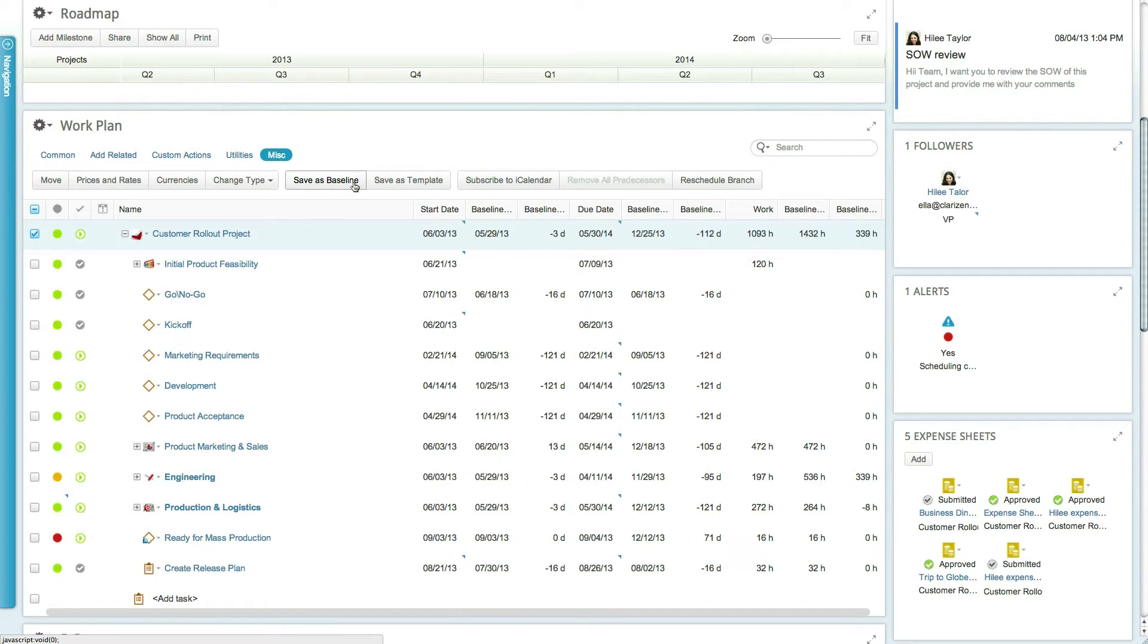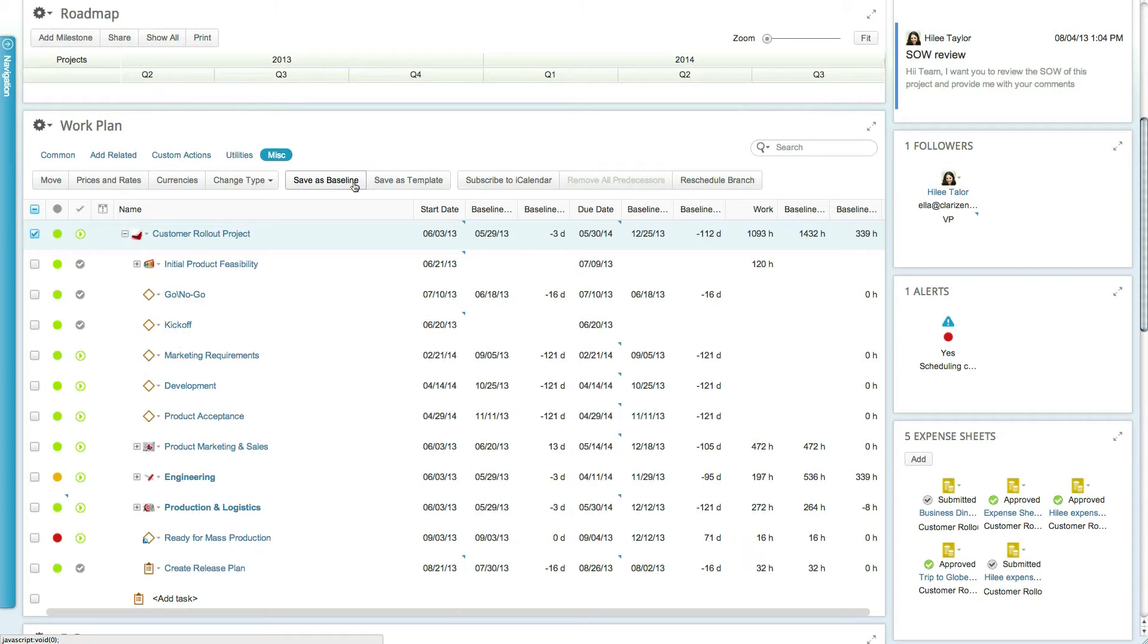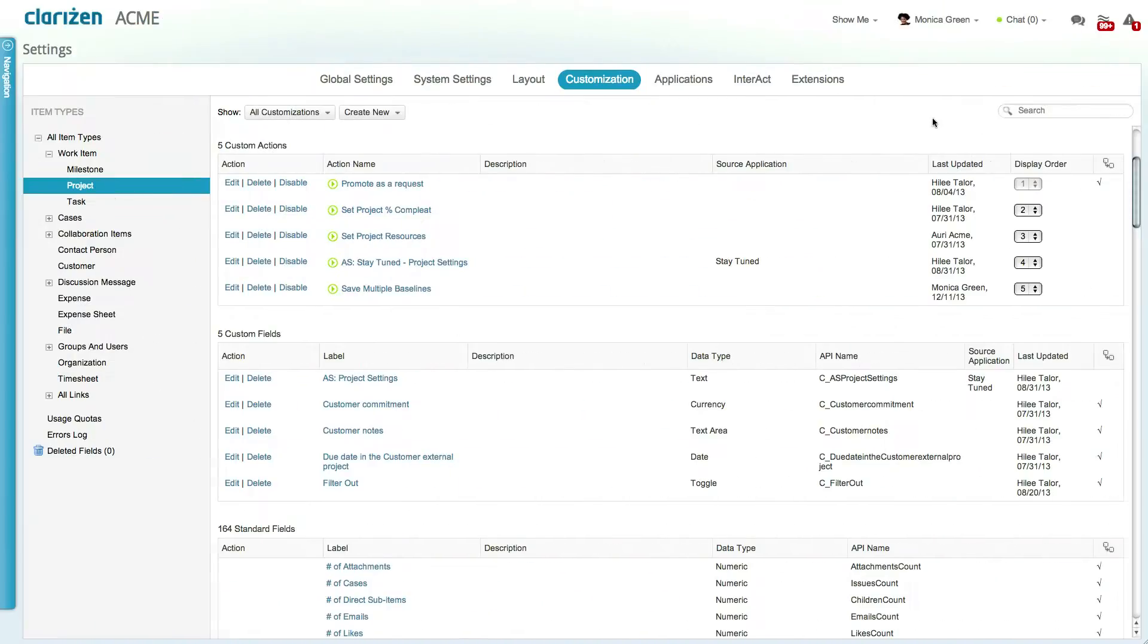This action freezes the project properties and scheduling parameters as a snapshot for future comparisons. Saving the baseline can happen multiple times during the project, but only the latest snapshot can be saved.